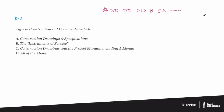Moving into design development, one SD option has been chosen and you're developing that design. By the end of DD, you should have a very clear actual design — all materials pretty well understood, shapes and sizes of all rooms determined, which walls are two-hour or one-hour fire-rated, how the stairwells and egress work. You've moved from abstract schematic ideas to what it actually is. SD and DD are still conversations with the owner — presentation-style drawings. DD starts moving toward CDs, but essentially SD and DD are conversations with the owner.